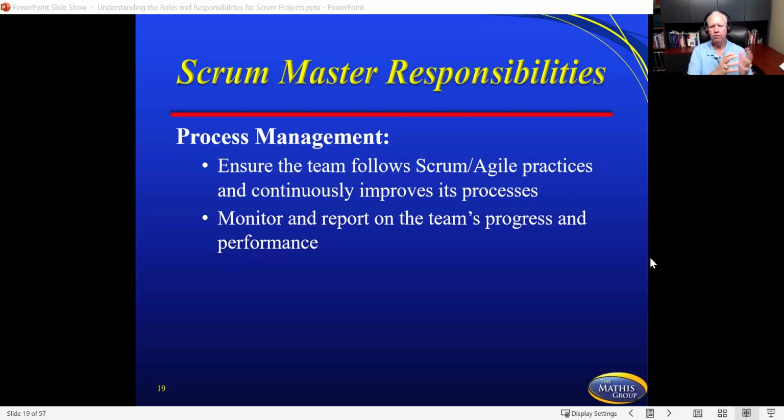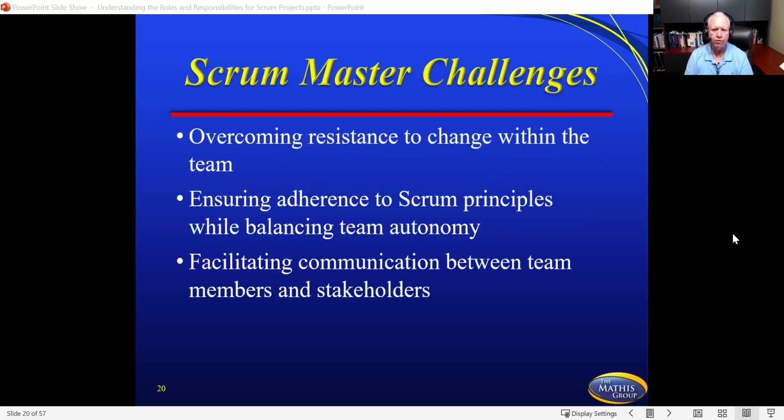The customer has 300 user stories, and you're delivering 15 a week, and 14 one week, and 12 another week. And so in three iterations, I can do an average and start projecting a range of when we're going to finish this project. The Scrum Master challenges.